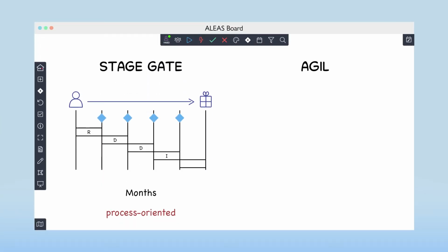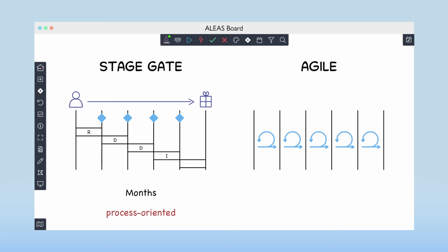So what is now the difference in the agile approach? First of all, it's answering the simple question, how do you eat an elephant? In small pieces. The work content is therefore cut into digestible units, often described in so-called user stories. In cycles of several weeks, clearly defined portions of user stories are worked on. In these sprints, all phases Heinz described in the traditional process are covered, incrementally generating the final product.